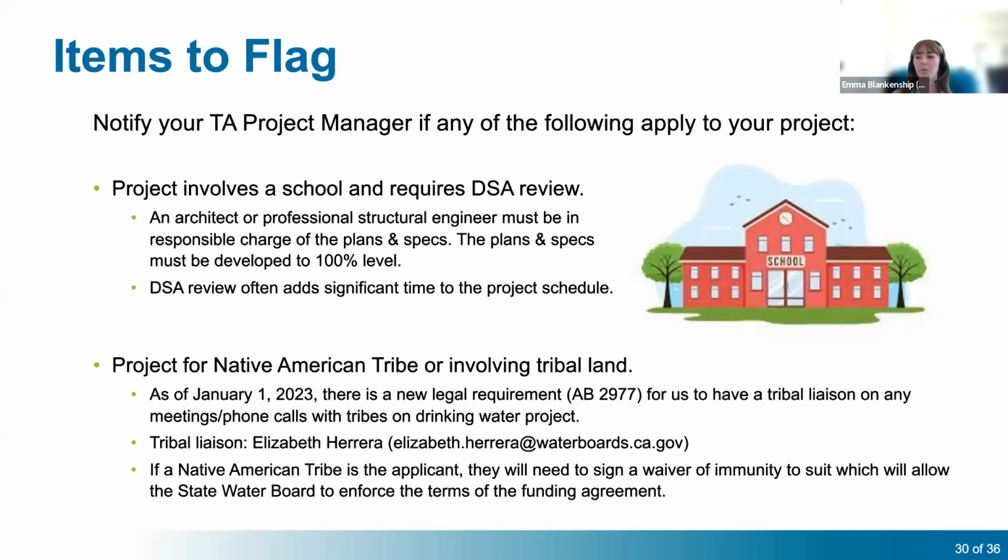And also another important thing to note: if a Native American tribe is the applicant, then they will need to sign a waiver of immunity to sue, which basically allows the State Water Board to enforce the terms of our funding agreement. Since this is often a sticking point with Native American tribes, it's best to let them know about this requirement as early as possible, possibly even at the kickoff call, just so they're not surprised by it later on in the project.